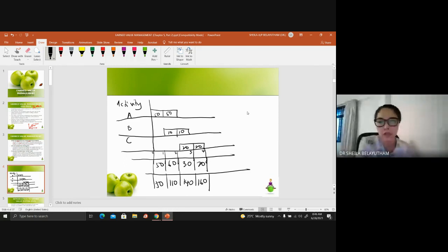Unless you think that for activity A you do not want to divide equally, because you would be heavier at the front end. For example, you think that for activity A you would want to complete 80% at the front end. You would have more resources there, and then 20% later. Then it's up to you.